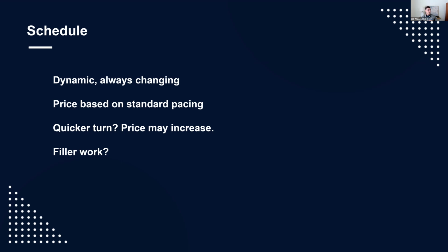So if I need the work, I can do it really quickly and get it done fast. Or I can wait till the end, just do a couple boxes a month until I need to start picking up the pace. If that's okay with you, we love that kind of work because it allows us to flex with the project based on other commitments that need a faster timeline, so you may get a little better price because it allows us that flexibility.